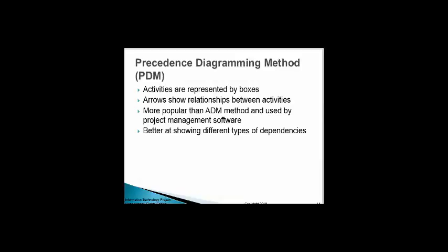And that's again a network diagram technique in which the boxes represent activities. Figure 6.3 here illustrates the type of dependencies that can occur among project activities, using the Microsoft Project Help screen. And we have the 4 types of dependencies, or the relationships between the activities, which are finish to start, start to start, finish to finish, and start to finish.